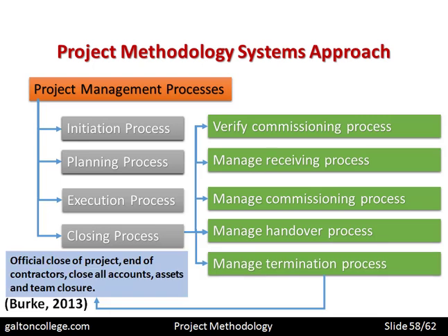So managed termination process. Officially close the project, end of contractors, close all accounts, assets and team closure, so that that project is complete, it's packed up, and the resources and the team who have expertise in managing projects of this type, of course, will still be available for other projects should they be required.